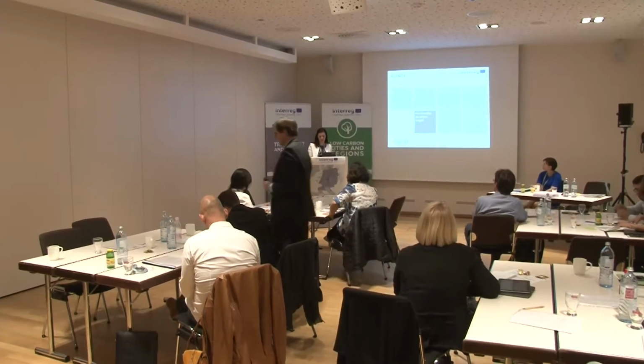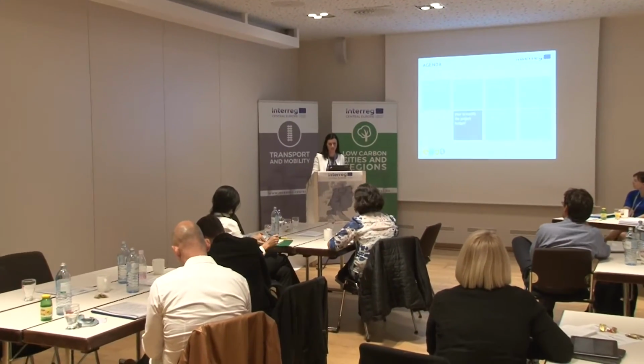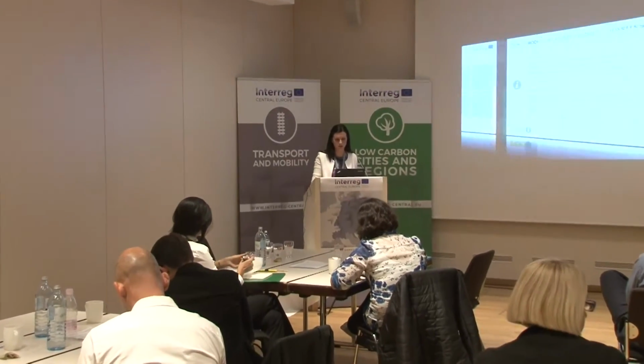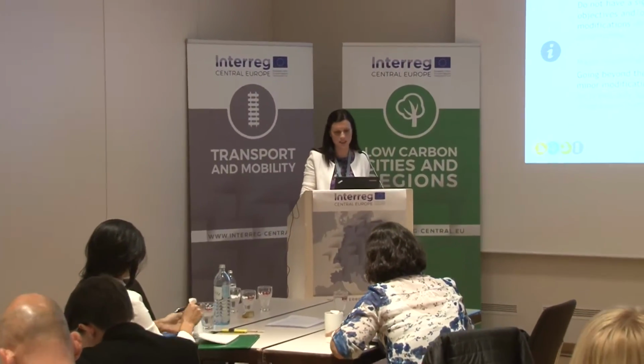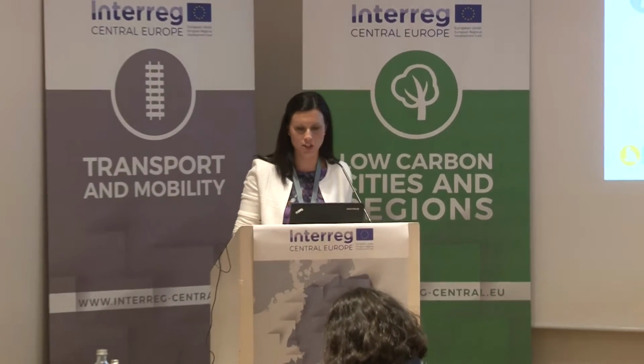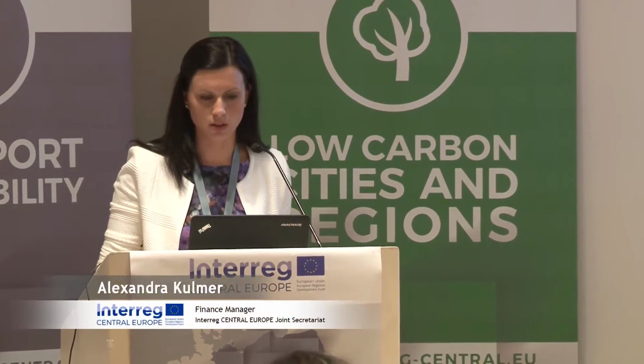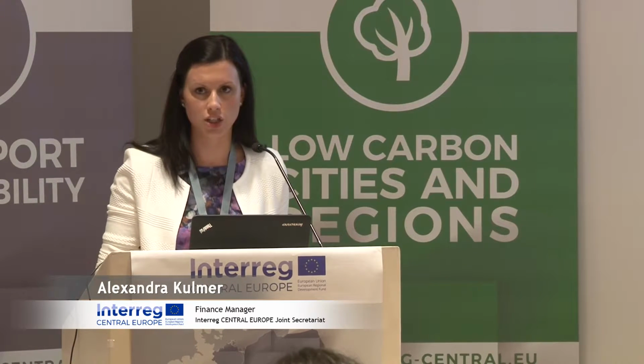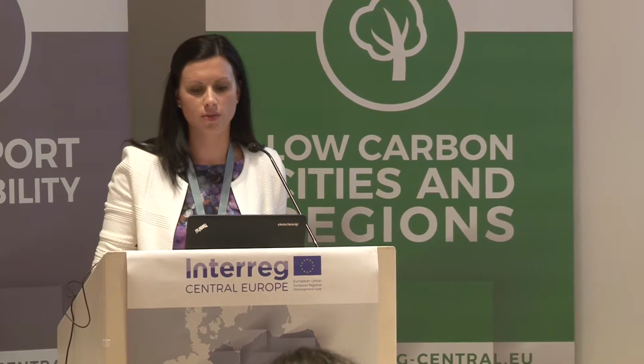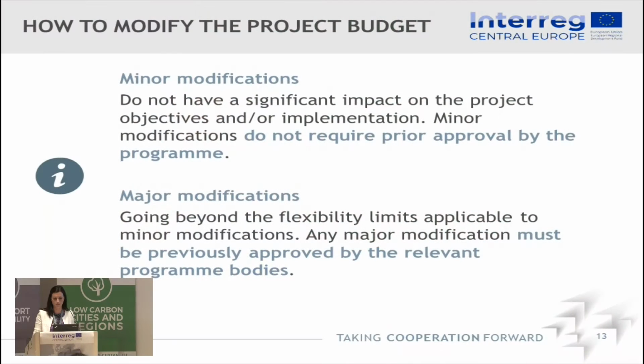So as said, we talk about minor and major budget modifications. What's the difference? The minor budget modifications have no significant impact on the project objectives or implementation, and they do not require prior approval by the program. But any major budget modifications going beyond the flexibility limits need the approval of the program bodies in advance.